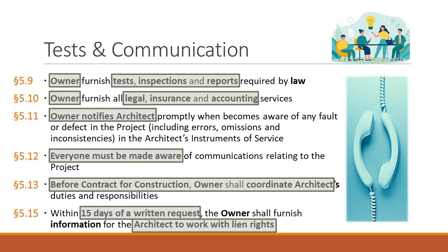In one sense, it protects the architect because now the architect, if it's left out, isn't still responsible, because in 2007, if you were left out but something was important, the architect could still be held. This one takes care of that. It also recognizes that the owner, this is why it's good for the owner, can now communicate directly with the contractor about some design stuff. As long as the owner loops the architect back in, the project can keep moving forward.